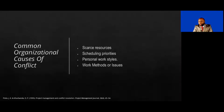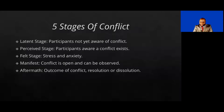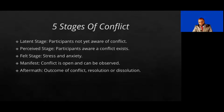There are five stages of conflict. The latent stage, where participants are not yet aware of the conflict. The perceived stage, where participants are aware that a conflict exists. The felt stage, where there is stress and anxiety. The manifest stage, where conflict is open and can be observed between two people or more. And then the aftermath, which is the outcome of a conflict — the resolution or dissolution.